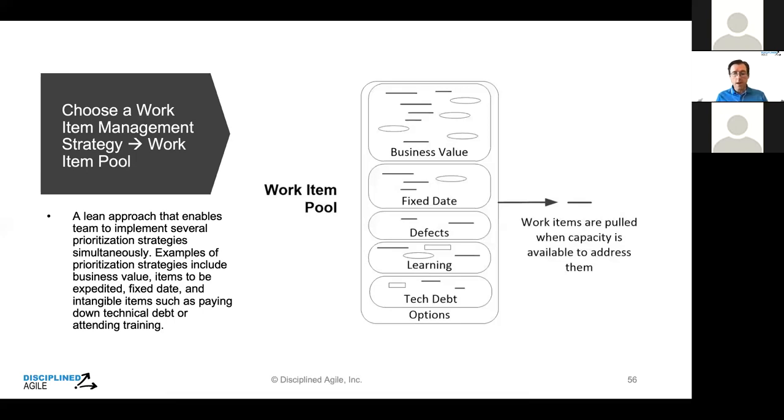If we're using a lean life cycle, we haven't locked ourselves into a 2-week iteration where scope change is generally discouraged within that iteration. In a lean idea, I work on something and I'm heads down working on it with my team. And if priorities are changing every day, I don't really care, because when I'm done this thing and I'm ready to pull something else in, that might have arrived an hour ago. It is the most important thing at that moment in time.